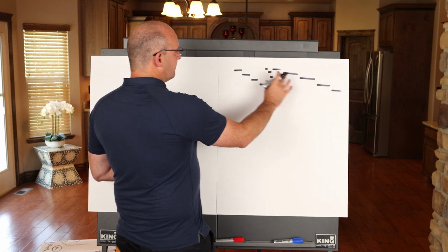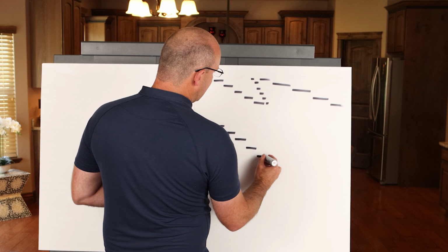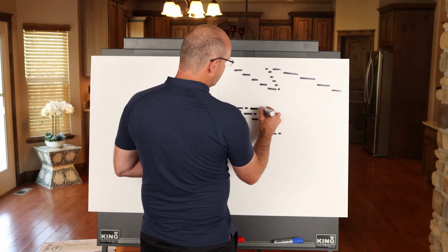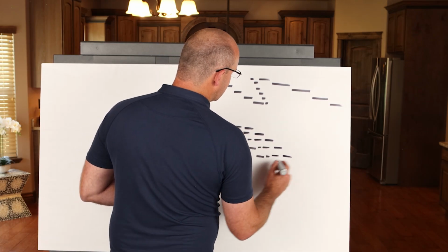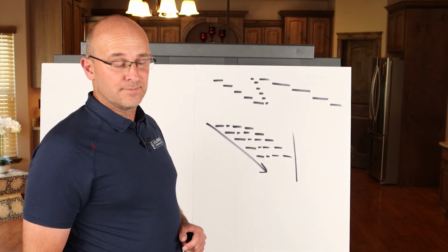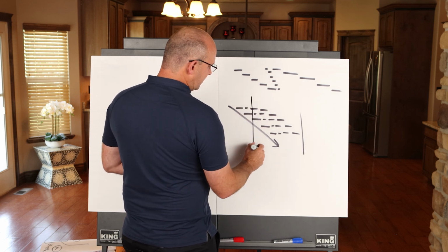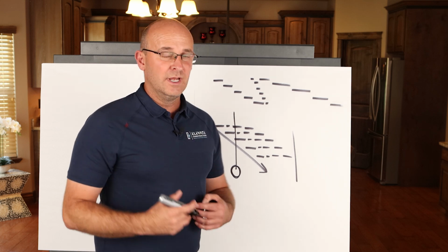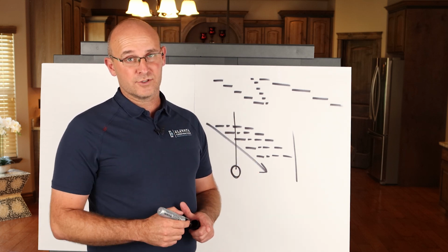But if you could package these to where you're on a consistent takt time generally, however you want it to work, you can get a more optimal production flow and a shorter duration because you're on a similar takt time. And the last thing that I want to say is that the takt time also says, hey, this is the trigger on the project site when we need to move to the next segment, manage handoffs, and stage materials to prepare for the next portion of work.